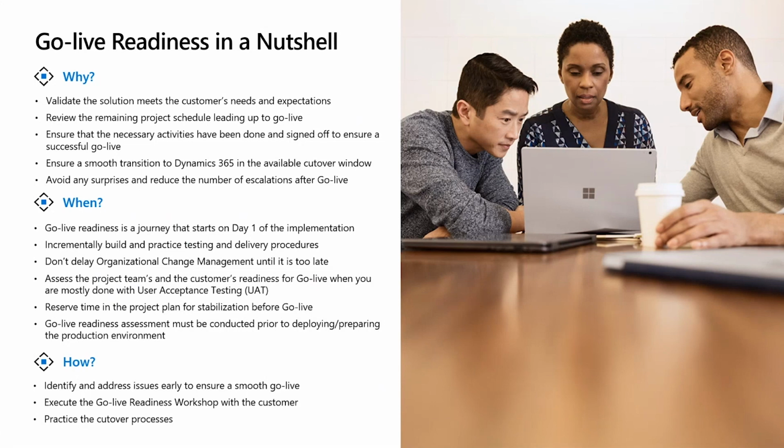Finally, with Success by Design, we will have a set of questions you can run by the customer as part of the Go Live Readiness Workshop and Review. Hopefully, this will help flush out any blind spots and help the entire project be reassured that things are indeed ready. Assuming this readiness is there, you should be in a good place to practice the cutover as a final exercise before the actual Go Live. Now remember, the goal of the Go Live Readiness Workshop is to ensure that the necessary activities have been done and signed off to ensure a successful go live.